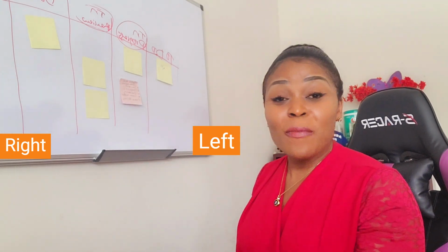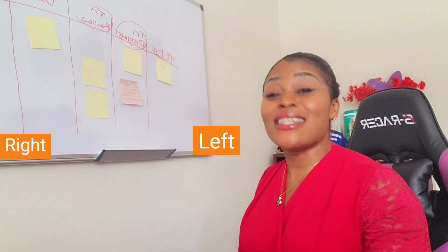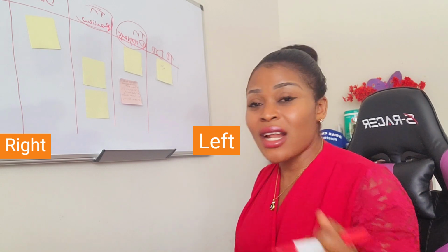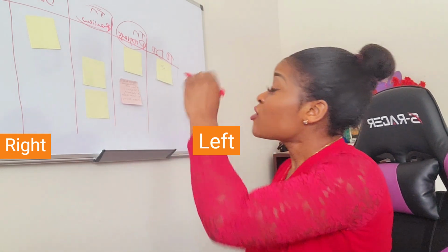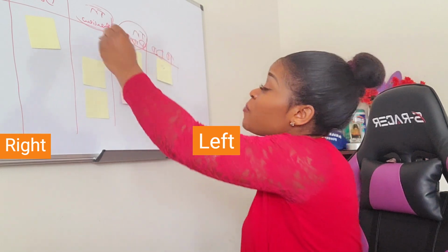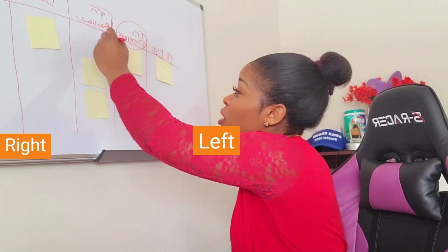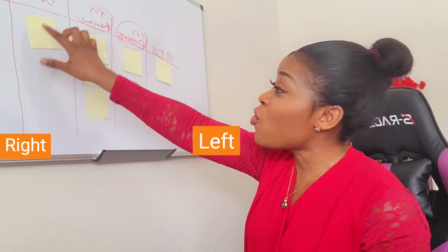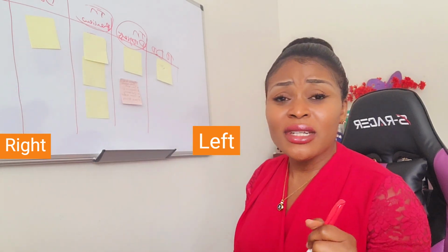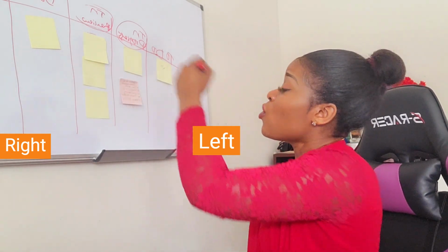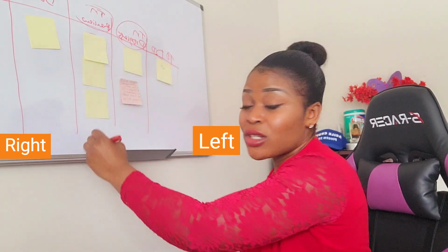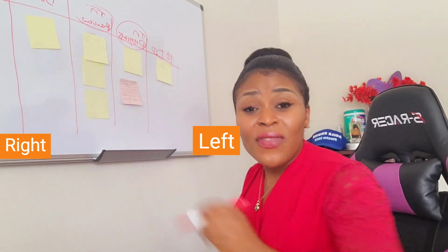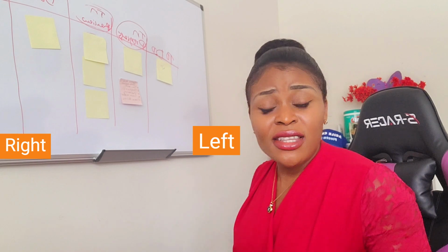And you know that in Scrum, until it is done, you cannot say it is done. As long as it is not done, even if it's 99.999% complete, you cannot claim the credit, because it's not done. So most of the time, all of the work will be done, and then the team members will put it in the review column. It's left for whoever has to review it so that they can close it out and move it to the done column. But it doesn't happen. And then I realize that at the end of the sprint, we are ending up with so many work items in the in review column and many in the in progress column and just 1 or nothing in the done column. And then we don't have anything to show our customers.